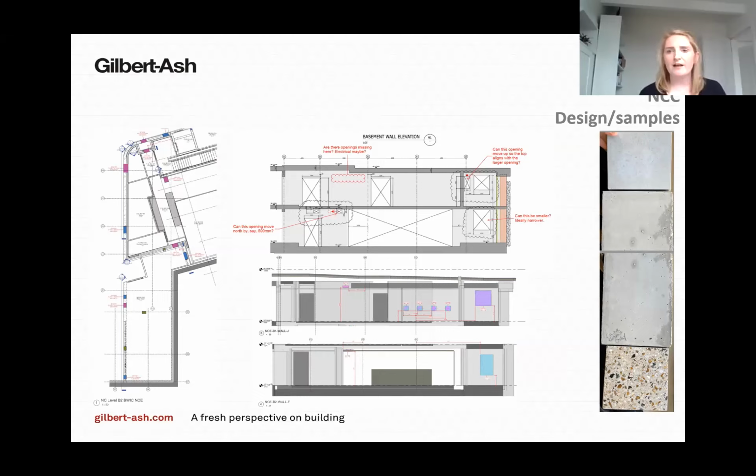Okay, thank you, Emmett. Just touching on the NCC basement a little bit, as Mike has described, obviously a very huge scale excavation had to occur, which required very early appointment of Sheet Piling UK. He also provided input before we were in contract. But once we go down, we need to very quickly start thinking about how we're going to start coming up again.